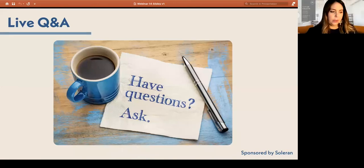Yeah, that's a good question. Vendors usually affect shutting down parts of the building. So one of our directors in planning, design, and construction is part of our committee, and that's kind of his job to make sure that the vendors working on construction sites and shutting down parts of the building know what's expected. They have to flush the building when they do shut it down. So we kind of delegated responsibility to him. He attends all of our meetings and provides updates on current construction projects.